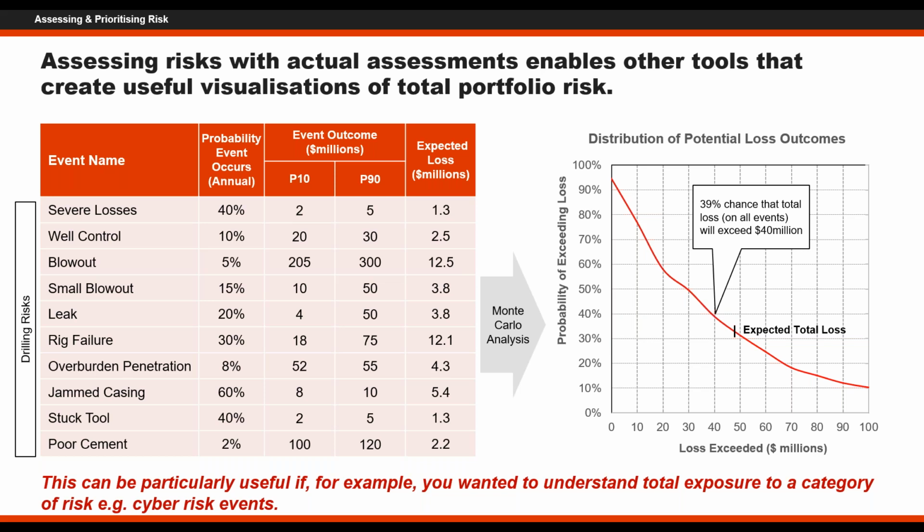So it's applied at the operational level specifically. And the main thing I see coming out of what Warwick just said is that some of the heat map thinking is okay. Just turn the two axes into number estimates of probability and consequence. If you do it in numbers, and preferably absolute impact numbers, not some kind of percentage change, then you can calculate expected losses and understand things much better. And remember, this part is still in what we call the selection assessment stage of which ones you really want to go after with a full decision analytic approach that Warwick will talk about next.